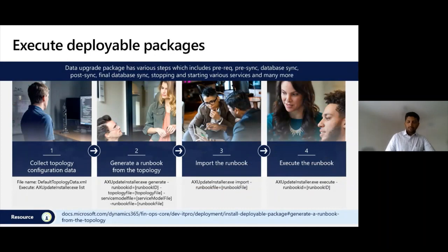In a dev environment, you can run the data upgrade package in two different ways. One is through the LCS portal itself. Now we have a new capability in the LCS portal where you go into the LCS portal, choose the data upgrade package, and then run it through the portal itself. But I would recommend you to run the data upgrade package through the command line.